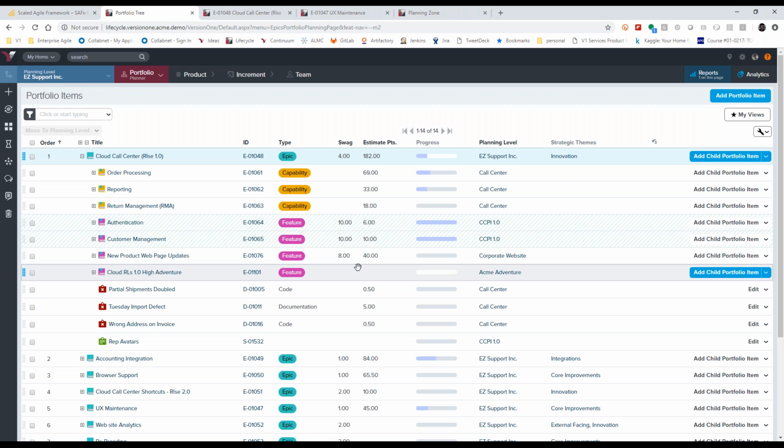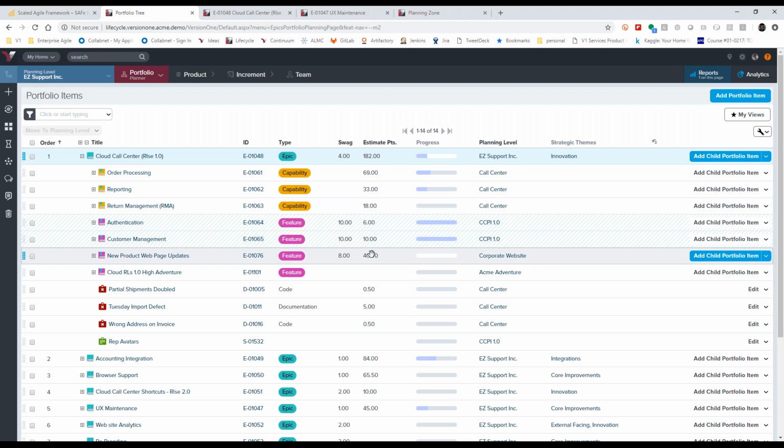The next question is, do you perform capacity analysis at epic level, or would you do them at story level? Is it worth the complexity? Do we do capacity analysis at the epic level or the story level? I would say in context of the question, all of our capacity is based on story level estimates because it is the closest estimation to the teams, and teams in version 1 are the resource that we are managing capacity for.